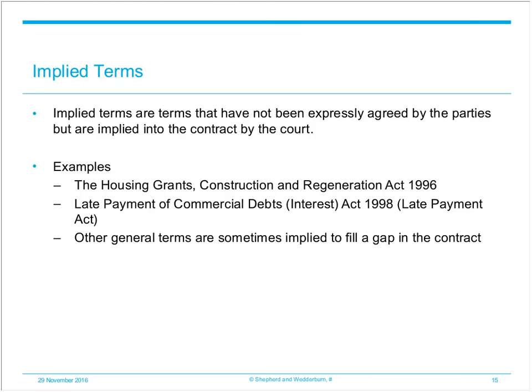And thirdly, other general terms are sometimes implied in order to fill a gap in a contract. For example, that performance should be started within a reasonable time, or that a person carrying out the work impliedly undertakes to exercise the ordinary standard of care and workmanship of a practitioner of that trade, even if those aspects aren't explicitly stated in the contract.